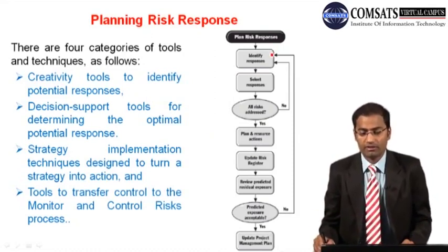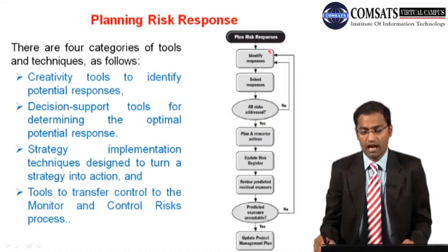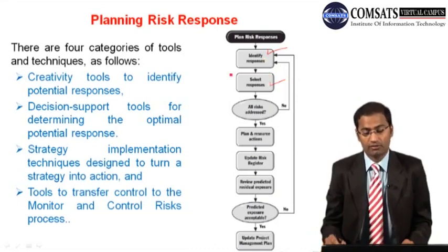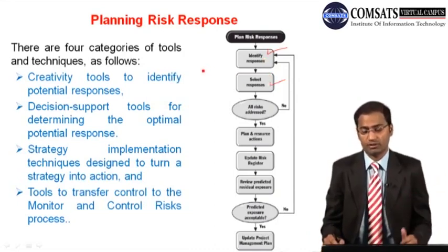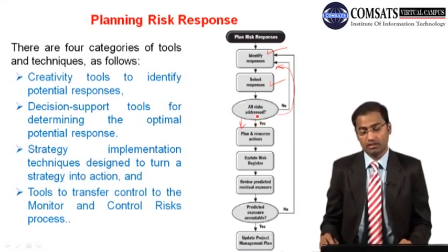So the first thing is identify responses if you have identified risks, and then select a response through identify response, and then select. Like if there was a list of 2, 3, 4, 5 responses, you have to select one response, and then check that all risks have been covered. If yes, you go ahead, if no, go back, and then again identify responses for those missed risks. And if you have addressed all the risks, then okay, yes, then plan resource and